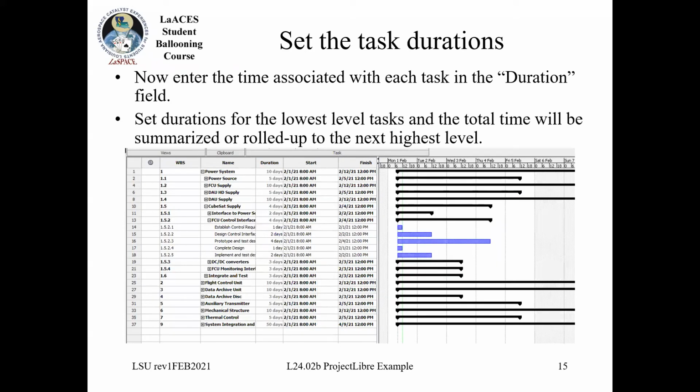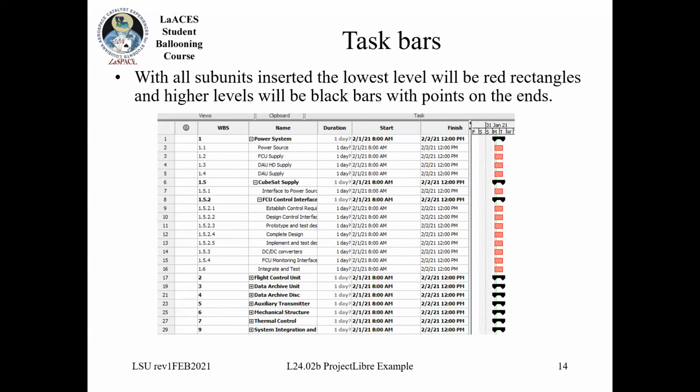So the next thing that I want to do is actually set realistic durations. If you remember, we didn't worry about the start and finish or durations. So it just defaults to this 1 day question mark. It just assumes that, hey, it might take a day. The question mark just indicates that it's an estimate. And that's just the default value that it's going to put in for all of these tasks.